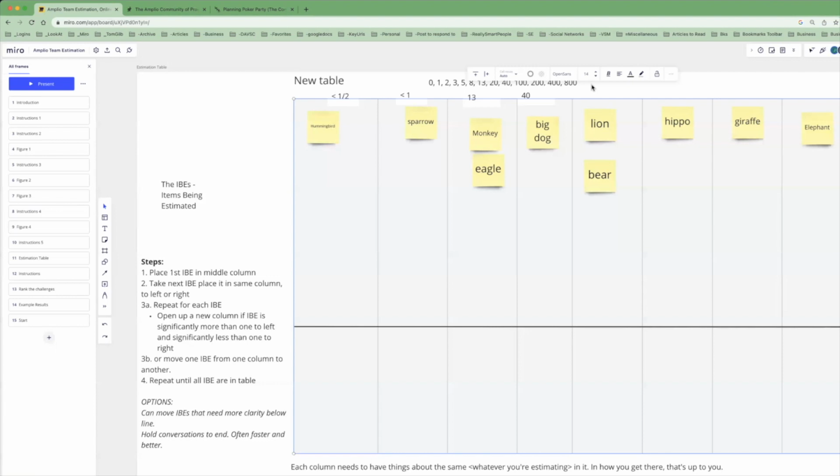They could also be 6 months work. You're writing a flight control system for an airplane. You don't get that done in 2 weeks. So the timing of an MBI is what's the smallest thing I can build that's of value to the customer. Now, I don't build it as a big waterfall thing. I build it as a slice, a slice, a slice, a slice. But I don't need to break it up except for 2 reasons.